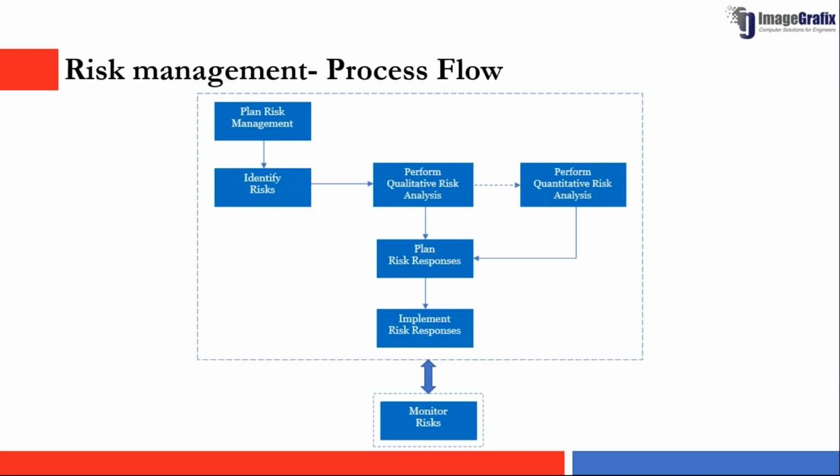So in risk monitoring and control, we have to come back and look again at the risk registry on a regular basis to see whether our planned actions have worked as expected and to discover if there are any new risks, and if there are any changes in the existing risks, such as the probability of occurring, the cost impact and schedule impact that risks might have.